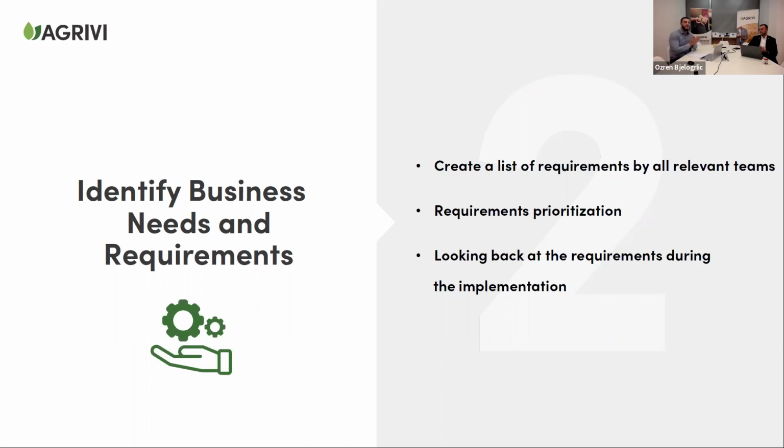So it's important, when you define requirements, you confirm them amongst different teams, you stand by that. The business owner is approving them or has commitment. The requirements prioritization is understood, communicated, then you are not changing them as you move forward.